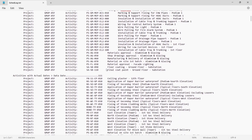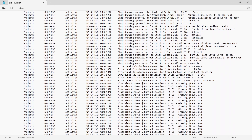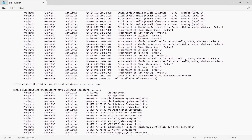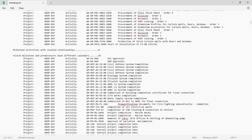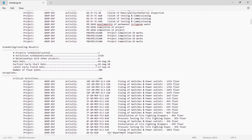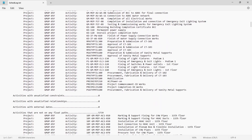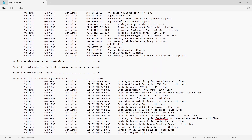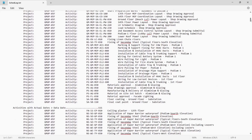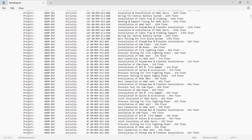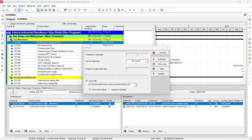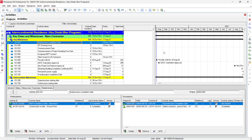Out-of-sequence activities will exist because this is an updated program — I have a separate video on eliminating them. After increasing the number of paths from 100 to 300 and re-running the schedule, activities not on any float path decreased from 6,200 to 5,708 — a reduction of about 500 activities. If you increase the number of paths further, this count can be reduced even more.